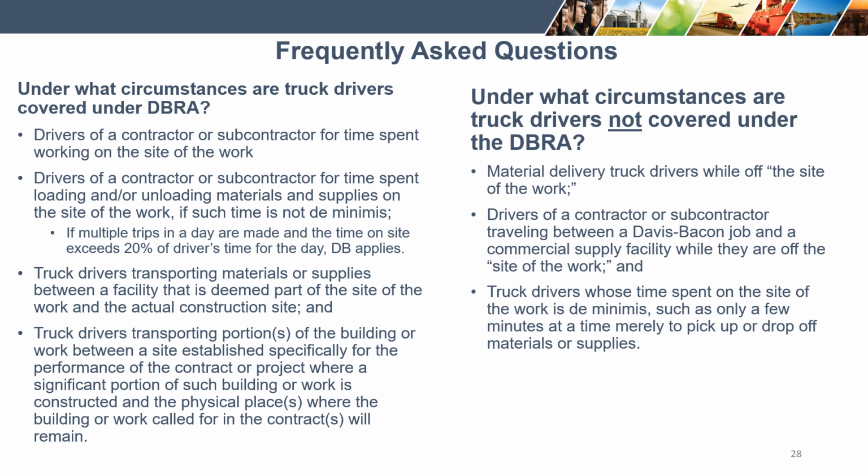Under what circumstances are truck drivers not covered under Davis-Bacon and related acts? Material delivery truck drivers while off the site of the work. Drivers of a contractor or subcontractor traveling between a Davis-Bacon job and a commercial supply facility while they are off the site of the work, and truck drivers whose time spent on the site of the work is de minimis.